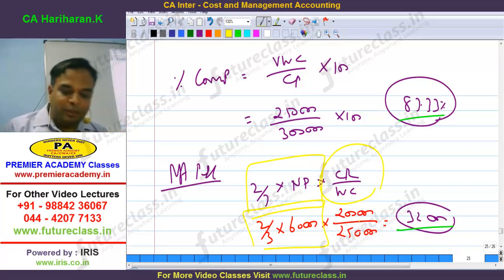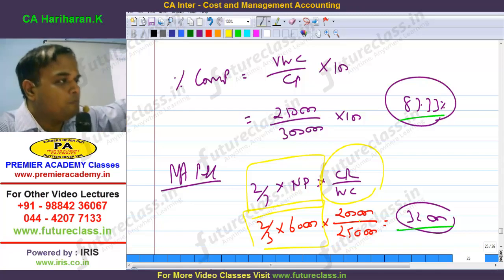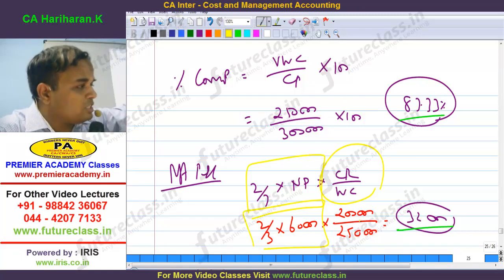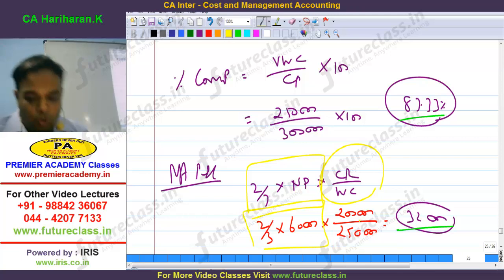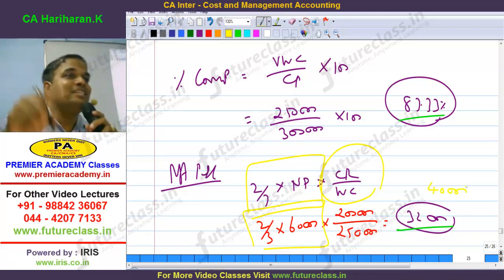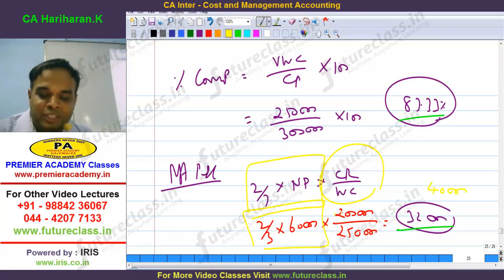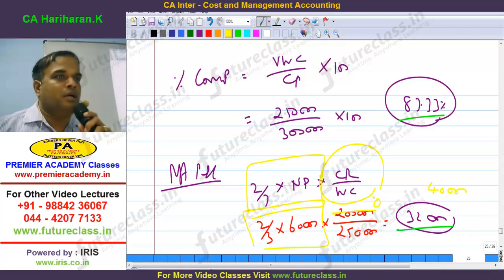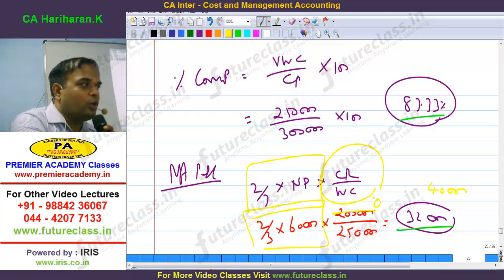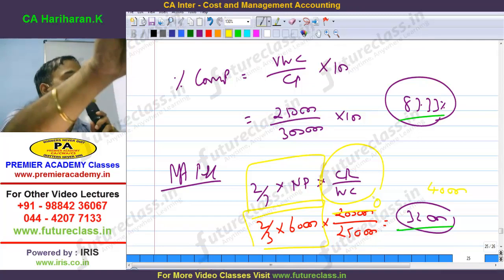Then, if I am going to put 2/3 of 60,000, how much will I get? 2/3 on 60,000, 40,000 to enjoy. So, I can enjoy 40,000. Am I right? Suppose I can enjoy 40,000. Cash is not yet given, zero cash only has been received. The contract is not yet released. Then 40,000 will come as per my account. Without having real cash, book profit 40 will be there.